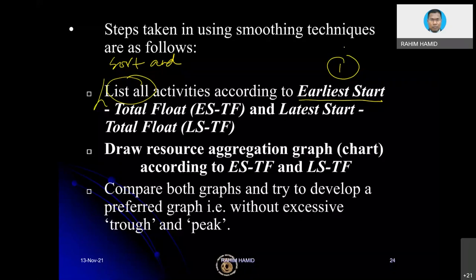Sorting, meaning to say, you are going to put in terms of priority which activity is number one, number two, number three, et cetera, later on as we go through the table. So if that is the situation, then we are going to look at the total float value for that activity. For sure, the activity which has the lowest or smallest total float will be prioritized, will be done first, okay? Will be done first, and then activities which have some value of total float, we are going to put